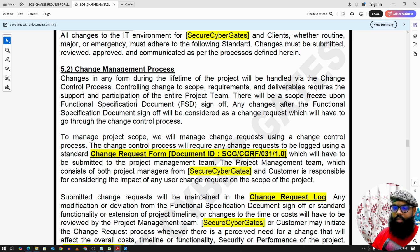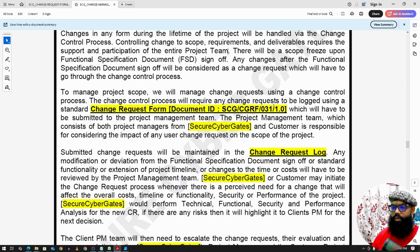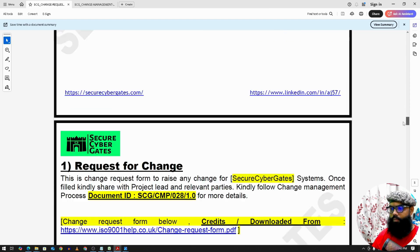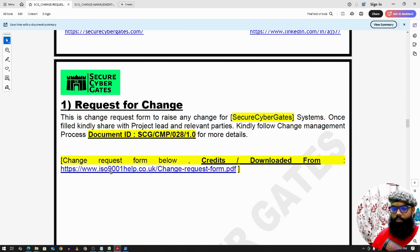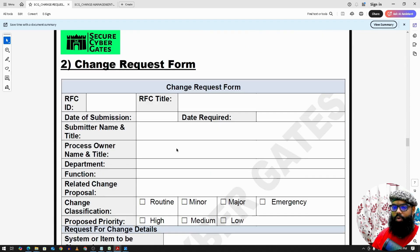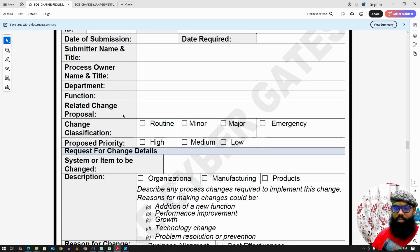Once we receive a new project and freeze the scope on the functional specification document, any subsequent changes — whether functional or non-functional — follow the change request form. This is a sample change request form. Once you identify that a change is needed, you fill in this form and send it for approval to the next team. The form includes a request-for-change ID, title, submission date, submitter name, impacted application, and department function.